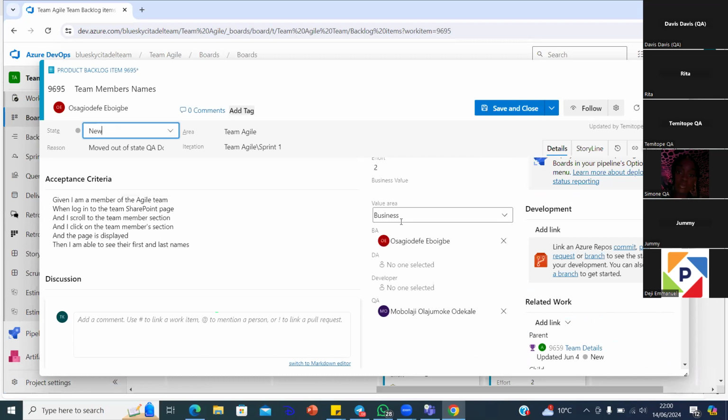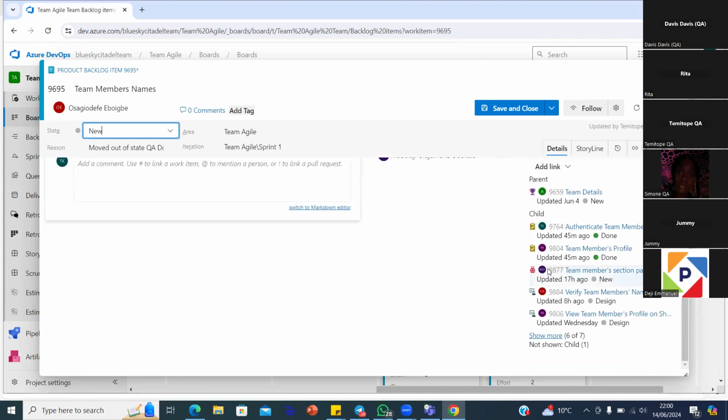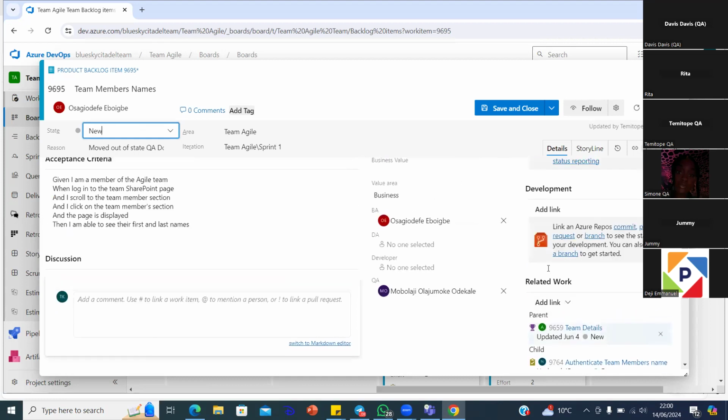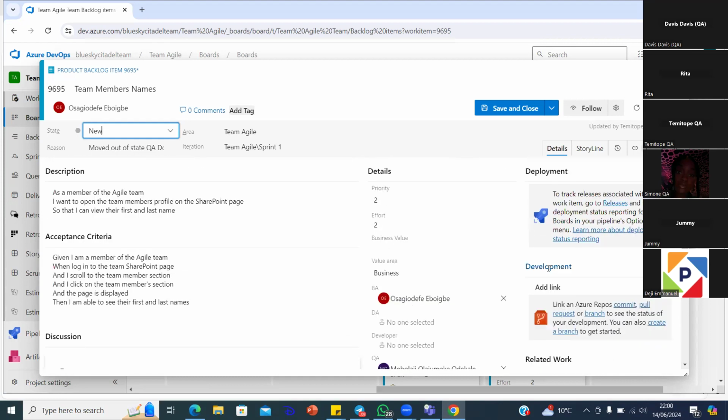Let's just assume that the bug is created, right? So another thing, can you scroll up? I just want to see what you've added to the bug. Okay. Then scroll down. Scroll up, is up. Okay. So you need to add screenshots to the bug, steps to create and everything else like that.